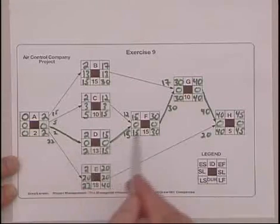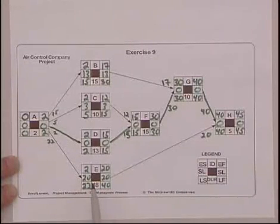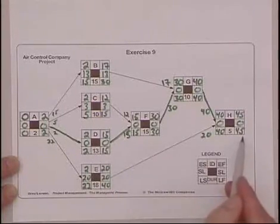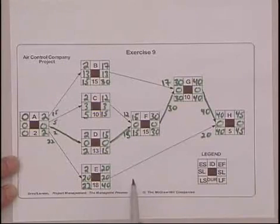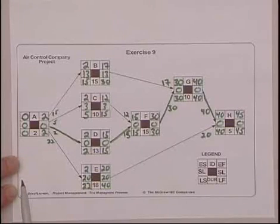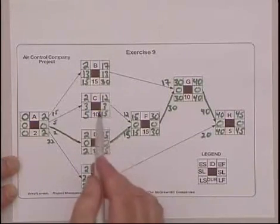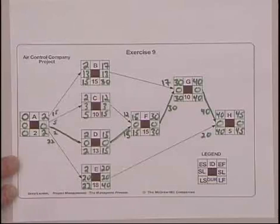A delay in the estimated duration of any one of these five activities will delay the project. If activity D takes 15 days instead of 13 days, it will add 2 days to the duration of the project. If, however, activity B instead of taking 15 days ends up taking 20 days, it would not delay the completion of the project because it has a slack of 13.